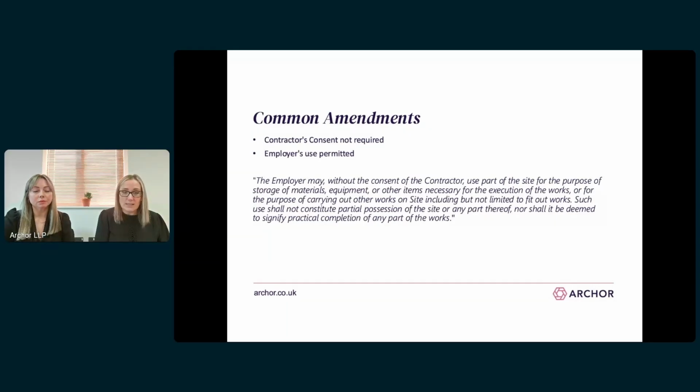We always advise clients to agree any access regime or usage plan prior to entering into the contract, and to actually append that to the contract so that the parties have agreed and made clear what can be done without it constituting partial possession. And if there's any change to that agreement, it may be that partial possession has occurred, or potentially it may be that there has been a change or an employer impediment under the contract, which triggers, as we've already said, a relevant event and or relevant matter, and potentially an increase to the contract sum.